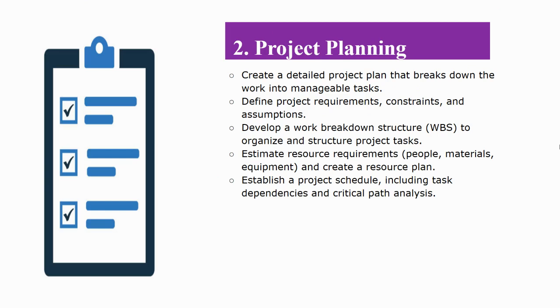Of course, there are different methodologies you can use in project management. For instance, you got the linear approach. The linear approach in project management is where we implement tasks from start to finish and we don't overlap. That means we have to do A before we move to B. We have to do B before we move to C because A will prepare us to do B and the rest of it. While the agile approach or the iterative approach allows us to overlap different tasks. In this case, we can implement several tasks at the same time and they can overlap. Of course, we don't have to do A before we do B.